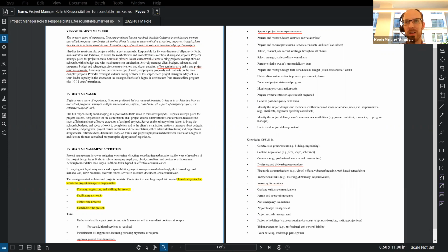I mean, we actually have a kind of QA/QC group that identifies upcoming project milestones and says, okay, we need to plan for a review for this, and we do third-party reviewers.